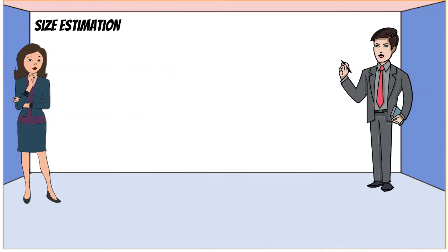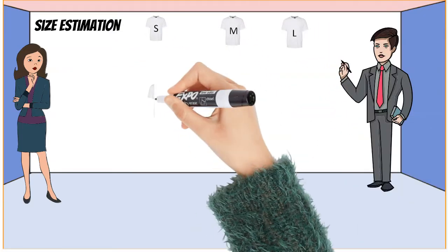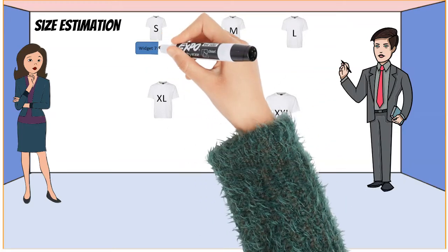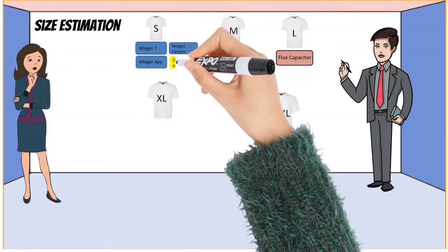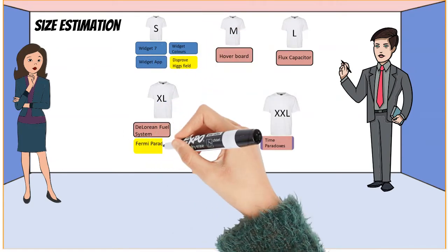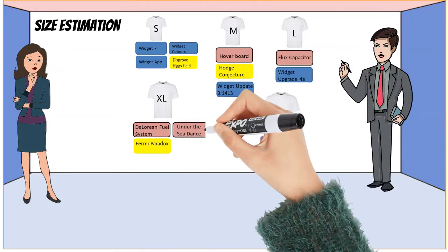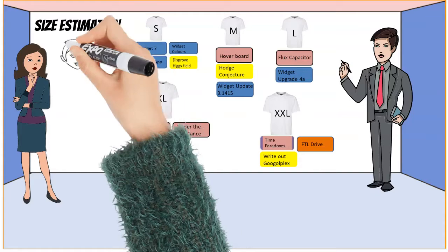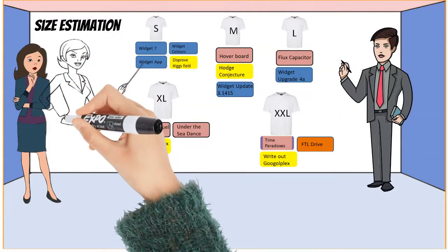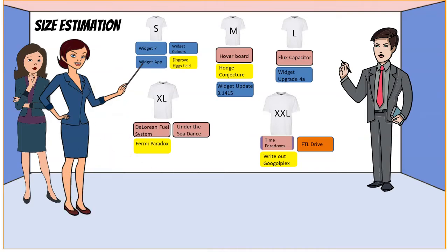Once the prioritised list is established, the whole room will be asked to provide their own t-shirt sizing, and a consensus of size is developed from the combined knowledge and experience of the participants. Planning poker is a useful tool here, and if you're not familiar with this, the method is that each person writes down their sizing estimate ranging from extra small to double extra large. Once all the scores are in, their sizing estimates are revealed and any outliers can be discussed. Generally, a consensus of the size will quickly emerge.